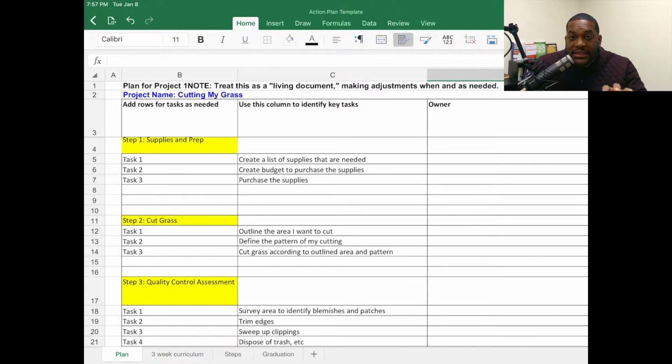Now, we're not done, right? I'm going to encourage you, when you're going through the planning process, don't try to plan out a perfect plan. What I encourage you to do is to go through this process and just allow you and your team to just spit out every idea that comes to mind. For example, you want to start with all the yellow steps first. What are the big high-level things we need to get done, and let everybody just say their piece? You might want to have a scribe who's going to capture all these yellow items.